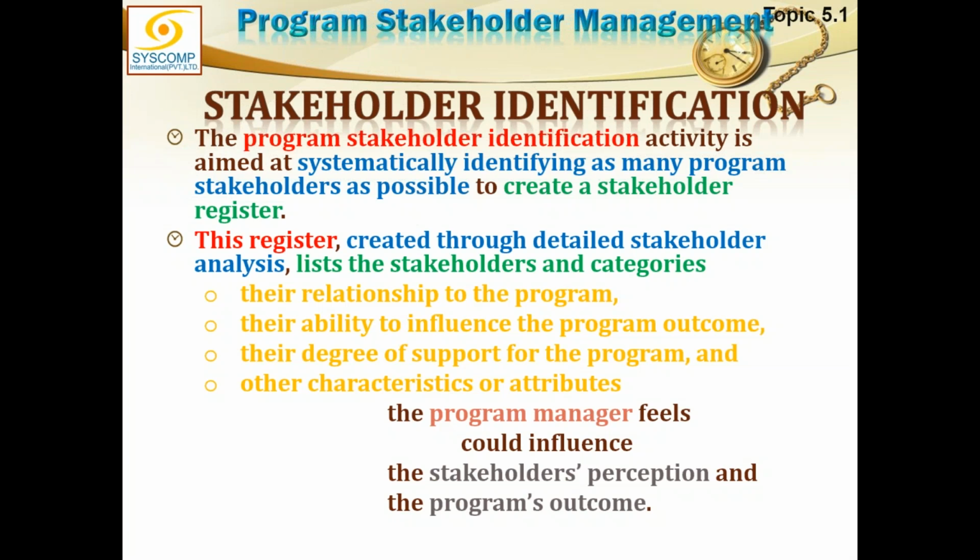The stakeholder register. You must have established criteria that these conditions should be met for anyone to be considered a program stakeholder. Anyone who fits that, no matter how small or big, must be entered into the register. This register, created through detailed stakeholder analysis, lists the stakeholders and categories.